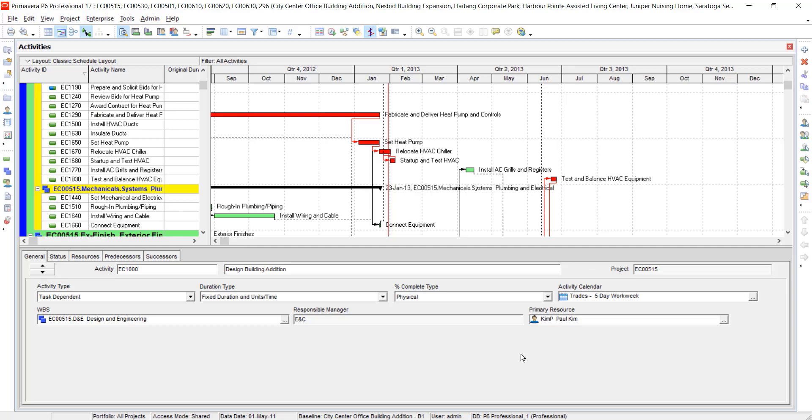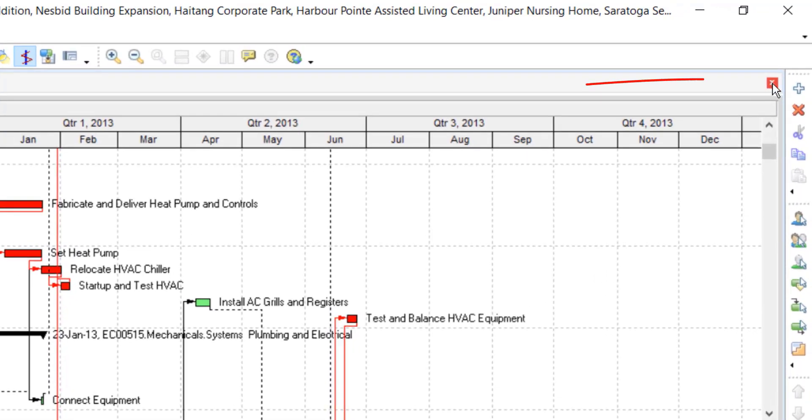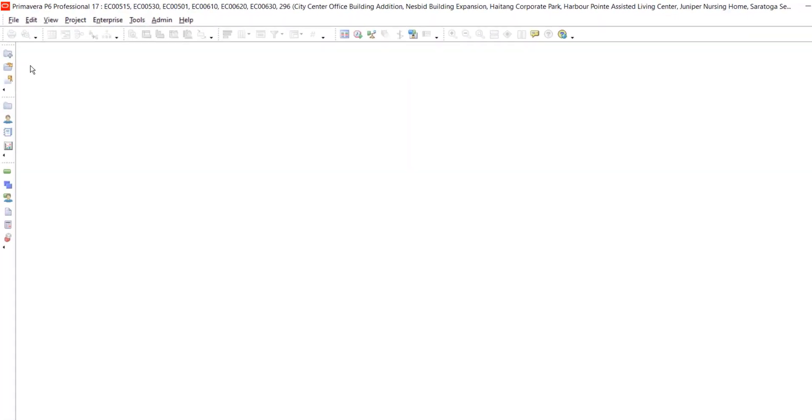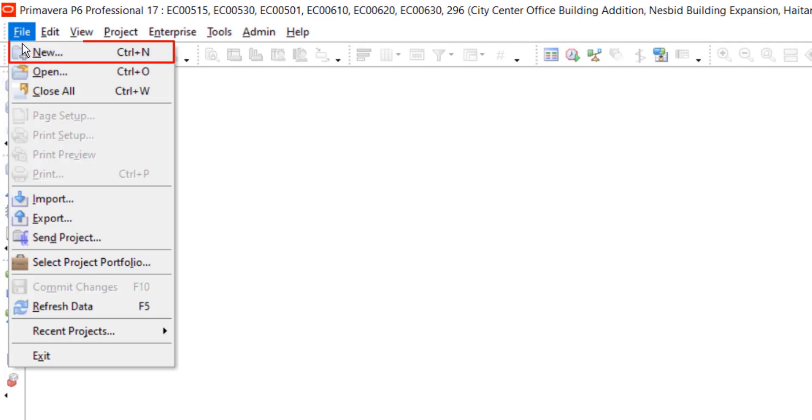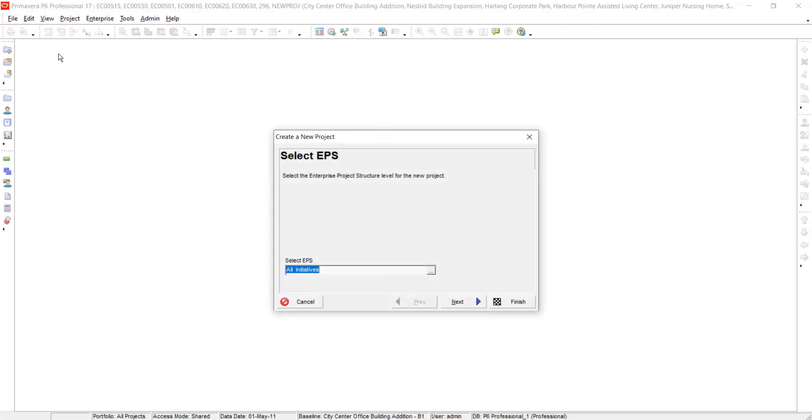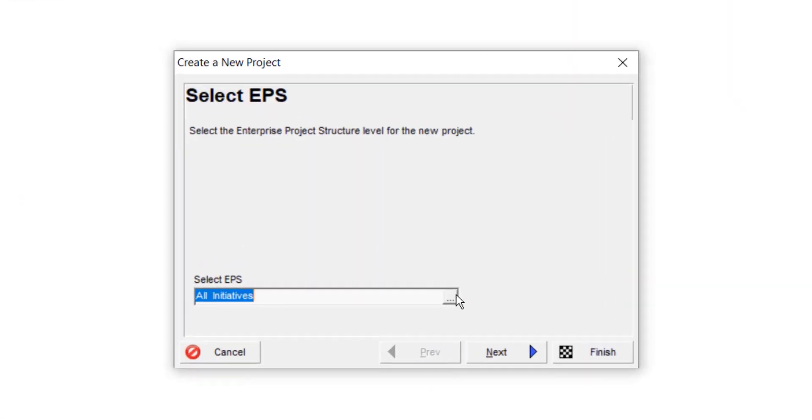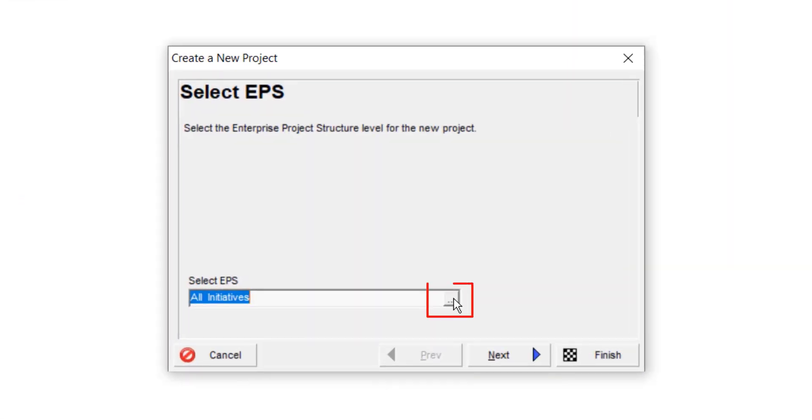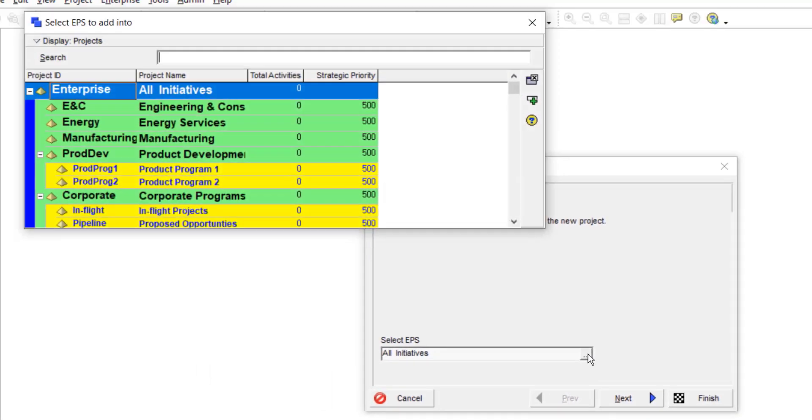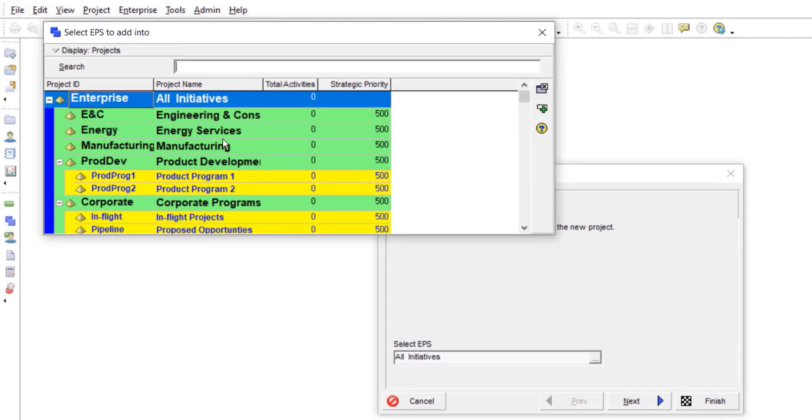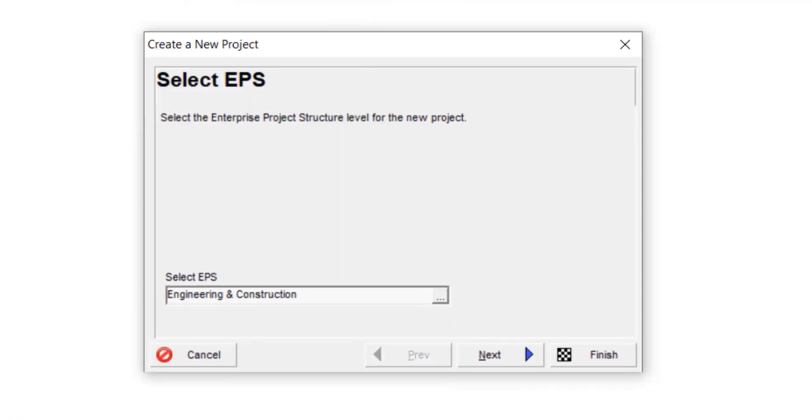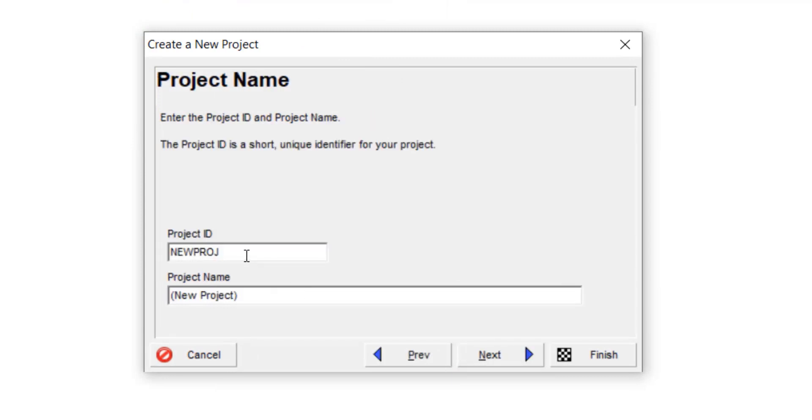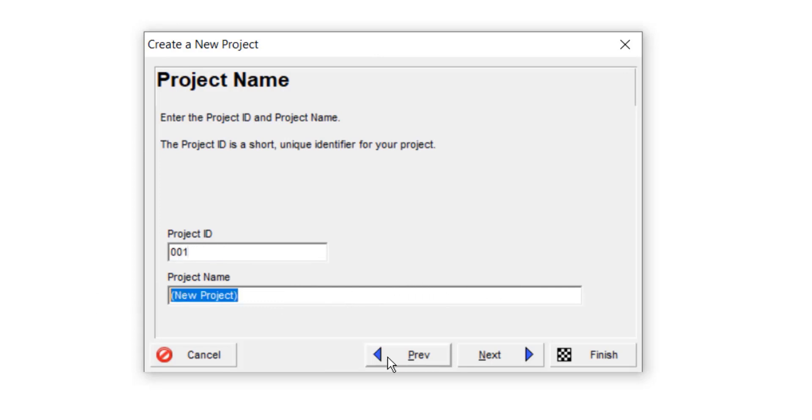Now we will create a new project. Close the current project. Go to file, select new. Click on these three dots. As it is our construction project, select engineering and construction. Double click on it. Select next. Select next. Create a project ID. I will write WB01 and the project name as house construction.